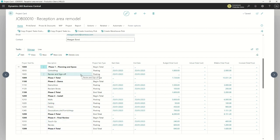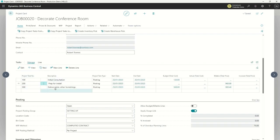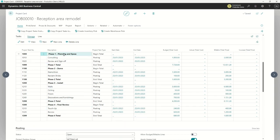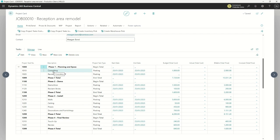This is a very structured, large project. If we look at one of the other projects — paging to the next one — this one has the same header information but it's much simpler: just three lines for an initial consultation, some prep, and a deliverable. One project has more of an overview of phases with different tasks involved. For each of these tasks there are planning lines in the background. A project can have one or many tasks, and each task can have one or many planning lines.